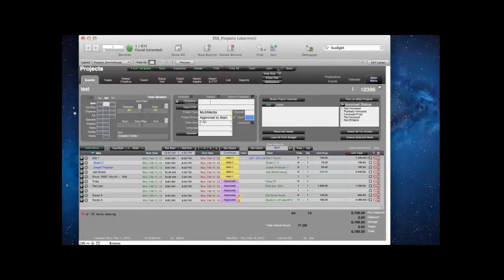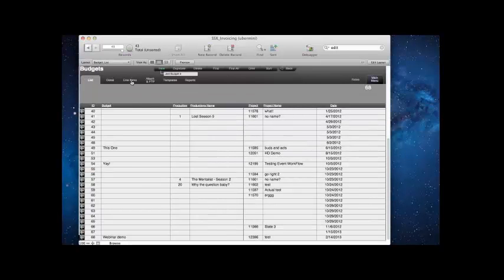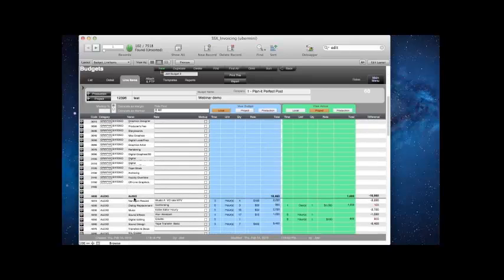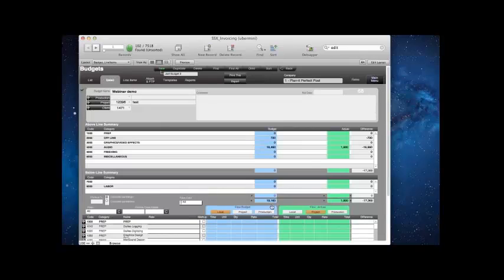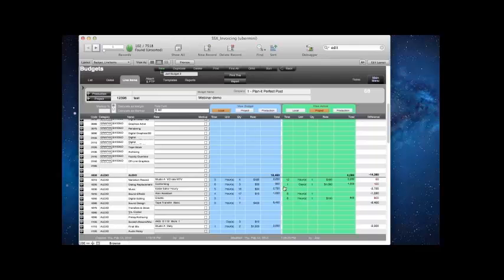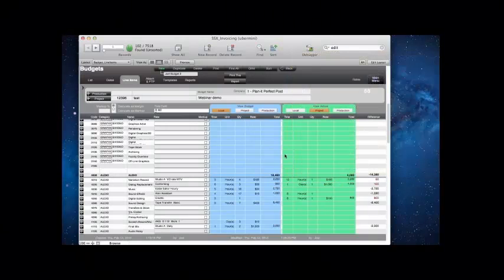So now I go back to my budget, and we're going to see this get reflected on that line item for 4010. Just got to refresh it. Scroll down. 4010 now has 12 hours at 185, and we can see that we're now $60 over budget. So that's kind of a bad demonstration of the budgets module, but I'm hoping that can give you enough.